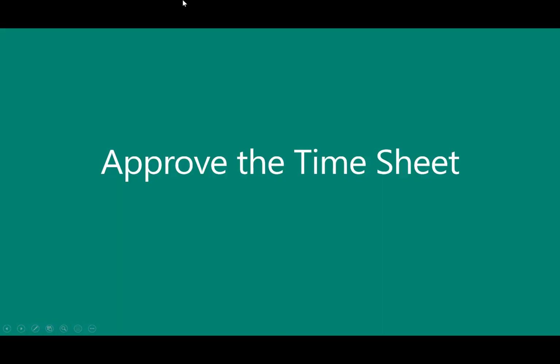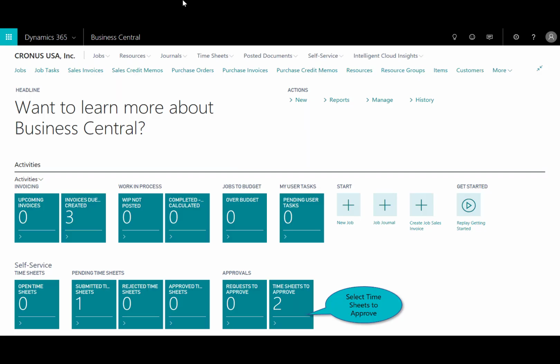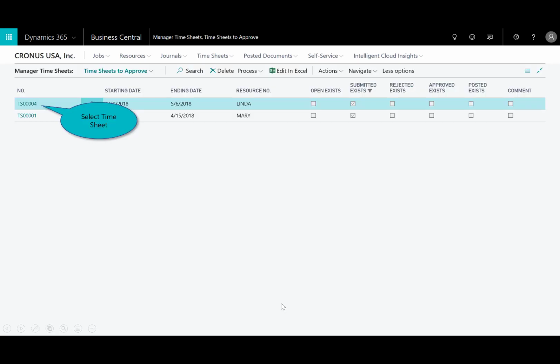Next, as the on-site consultant, they've already submitted their time associated with a job and a specific task. The project manager then has the responsibility to approve their time, which in turn then would trigger all the accounting policies to bill that client. So you see here too, first of all, there's no longer an open timesheet. You'll see the timesheets here. Now I have 2 to approve.